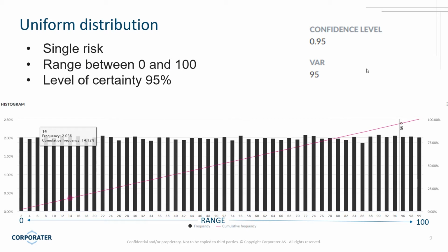And then if I want to report on a confidence level here, like if I want to be 95% confident, that's something I decide. I could decide I want to be 90%, 85%, 50%. It doesn't really matter, but it's something I decide. If I want to determine the value at risk at a particular confidence level, what we'll be saying is if I want to be 95% confident, I have this spark line here at 95%. It means 95% of my values are at this level or below.